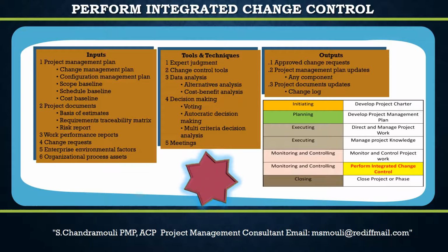Change control system is a collection of formal, not informal, documented procedures that defines how project performance will be monitored and evaluated. It includes the A. Paperwork, B. Tracking systems, C. Processes, and D. Approval levels needed for authorizing change. In many cases, the change control system of the performing organization can be adopted as is for use by the project.